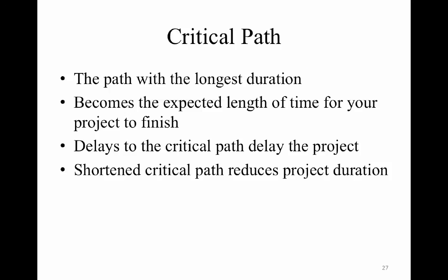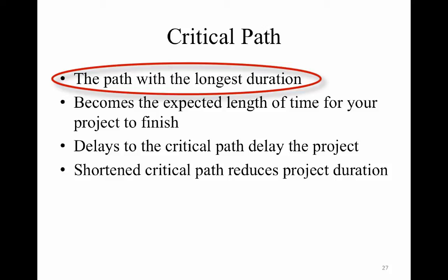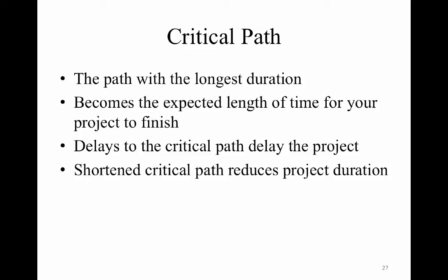The critical path has the longest duration of any path in the process, or in the project, I should say. It becomes the expected length of the time for your project to finish, meaning that if you increase the time to one critical path activity, you're ultimately increasing the overall project length. Conversely, if you shorten the duration of one task on the critical path, it may shorten the overall project duration.